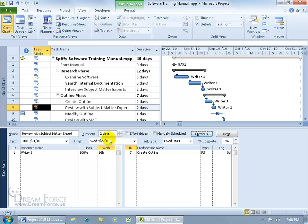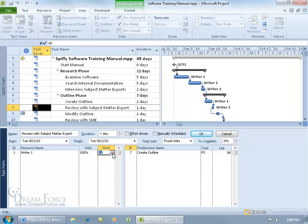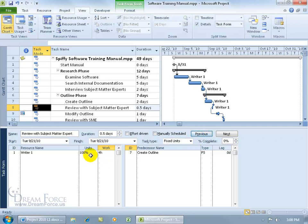Because in the formula, 8 times 2 equals 16 hours of work. I can undo that. Then if I change the work down to 4 hours and click OK, it doesn't change the units — it can't, because it's fixed units. We have control over that field. Instead, the formula goes to the other field: he could probably get this done in a half a day since that's the time he's working, so it reduces the duration to a half day instead.